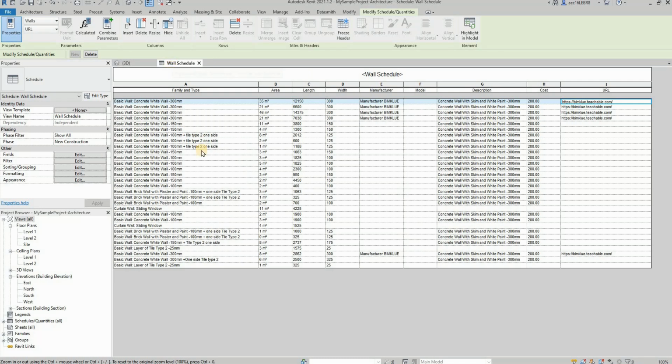So next thing is, if I want to know how much the cost is. This is the cost. So how many square meters, and then normally QS use the square meters of the wall times the costing here. So you have the quantity now, and then you simply multiply by your cost, then you can get your building cost.